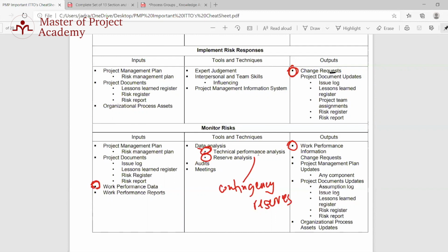Because you need to account for risk on your project, and for the risk management activities in the project. Instead of having a team member pad certain estimates, we want to identify the risk attached to that reason for any padding.